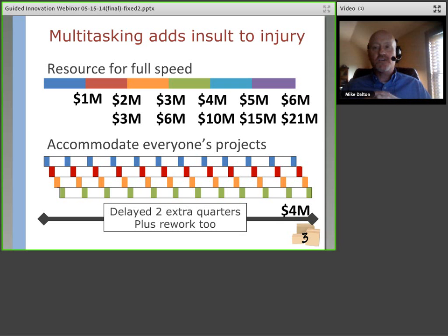So what we're going to see is it's going to take more like 18 months to finish those projects when we add in the negative elements from multitasking, which means that we can get 6 projects done in that same time. And again, take a look at the difference in cash flow. You lose that compounding cash flow effect when you work this way.